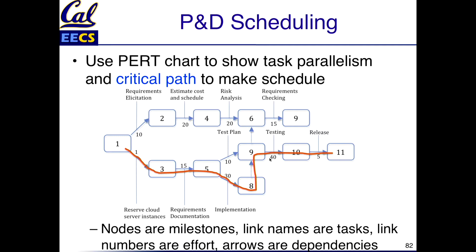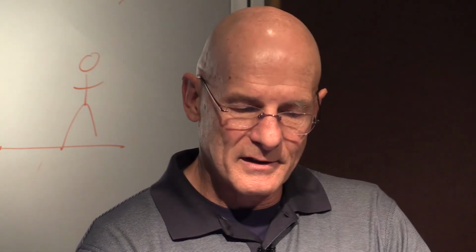So you just divide up all the efforts along those lines, and then some kind of productivity factor, and that tells you how long it would take to do the project. And it could show you what things you can do in parallel. So if you're the project manager, you did the SRS, you break it into tasks, you get it into costs, and then you use those to create the schedule using something like Pert charts.